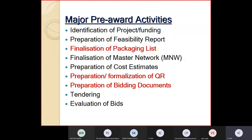How the project starts - the identification of the transmission project is important. How this project is identified is done based on load and generation balancing and after system studies.